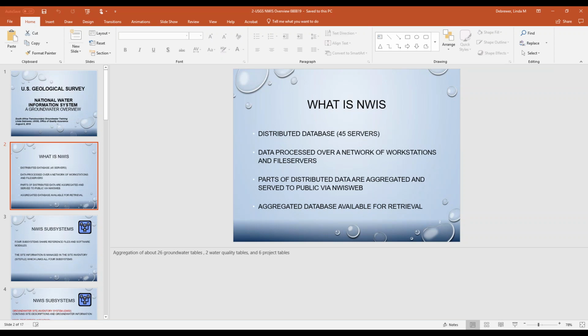No, I did hear the question. She asked about lessons learned, and I think it's a very good question. Lessons learned really include the type of data that you're collecting, to make sure you consistently collect things like your measuring point, your land surface datum, the locational information about your site. Over time we've added database fields, so the historic information doesn't have as much context, but the newer sites and the newer data entry do. It makes it very hard to connect the dots.